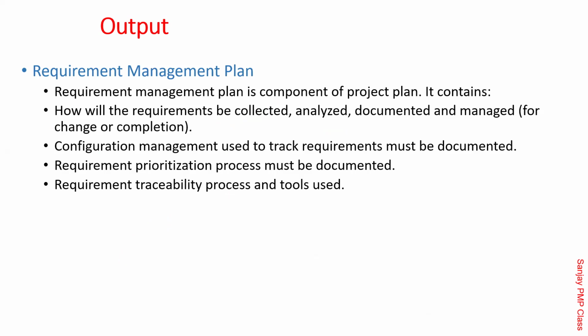Then he says, I think you should also include that. Then he comes back and says, no, this one I want. If 5 such changes happen, remember, friends, you are sitting on a time bomb. In the final presentation, something or the other you will miss. That's where configuration management tells how you are going to track the requirements from the initial stage to the end.